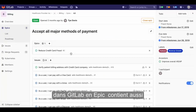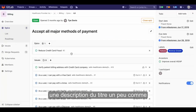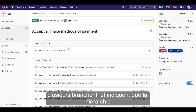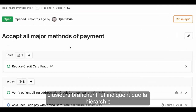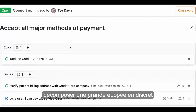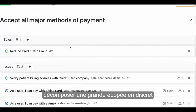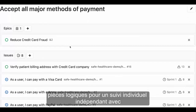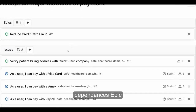In GitLab, an EPIC also contains a title and description, much like an issue, but it allows you to attach multiple child issues to it and indicate that hierarchy. Break down a large EPIC into discrete logical pieces for individual independent tracking with child EPICs and issues.